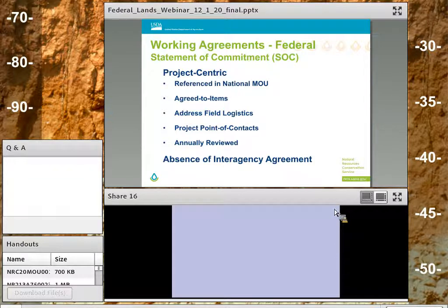The Statement of Commitment isn't the project plan, but it outlines the expectations of each party in making the project a success mutually. So we're really looking to identify from our partner an administrative contact and a technical contact to pair with our regional director and our MLRA project leader. And we liaisons should also review and concur with these documents along with the regional director.